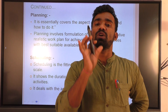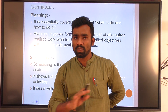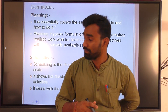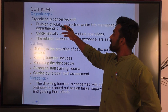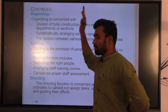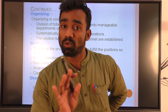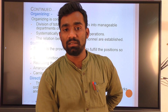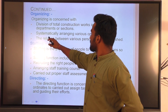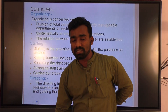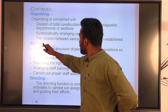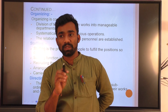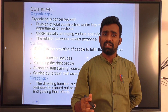Scheduling means feeding the final work plan through a time scale. With a time period you fix your work — for example, on the first day you clear the site, next excavation, next sand filling, brickwork, then PCC, and so on, so the work will be schedulable. Organizing means dividing construction work into manageable departments. One head of department cannot control all works going on in the organization — they should organize people at the ground level and divide the work. Operations at the site should be systematically managed, and good relations with all personnel should be established.